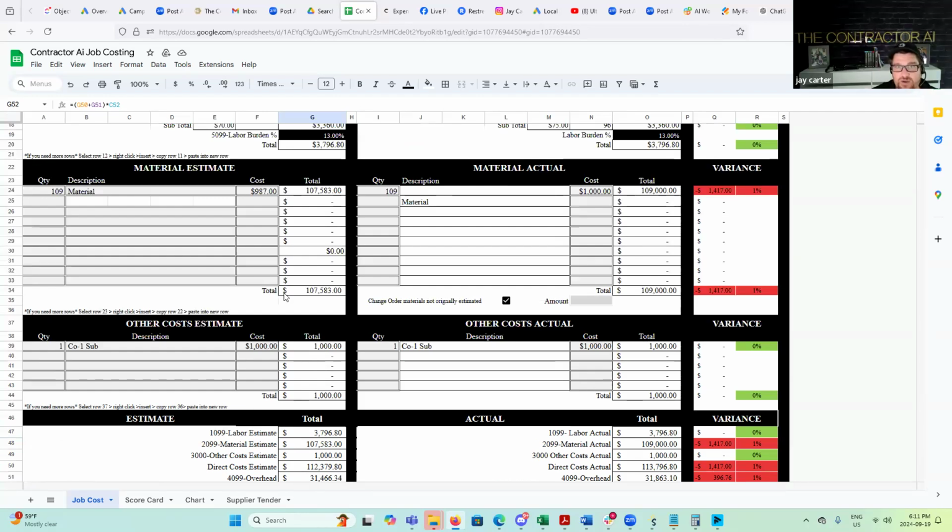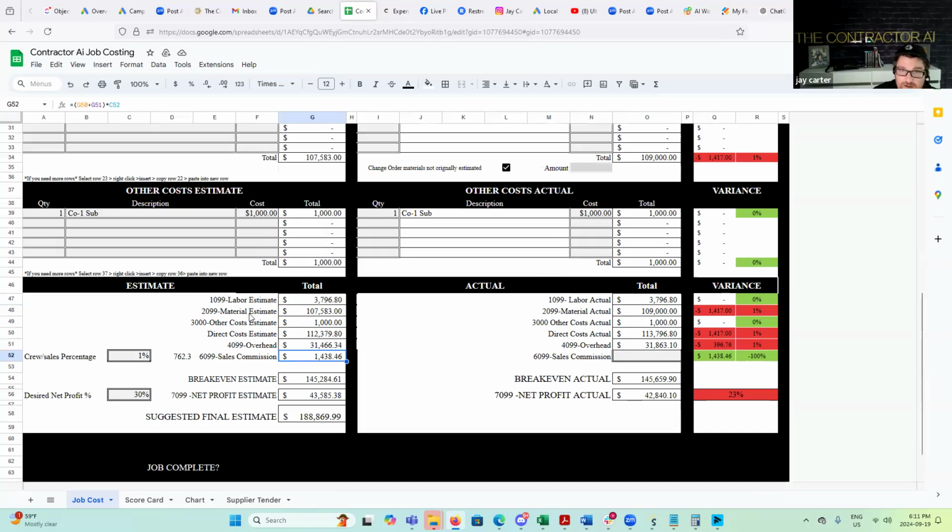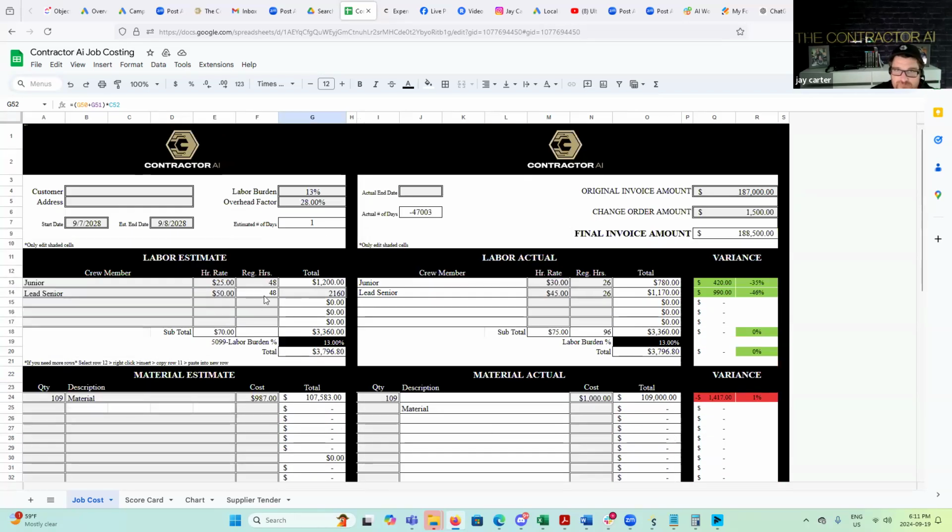Cool. And then you bring this in, and guys, I'm not exaggerating, this is the gas that will push you past all your competitors. Even employees I'm bringing in, bringing their jobs in below what a subcontractor would, I'm getting the quality, and I'm getting the image and everything else. And what they don't realize is it's really just the hours that they've saved. So if I've budgeted for 48 hours and they brought it in at 26, I'm putting that into a pool. At the end of the quarter, the company gets half, they get half.